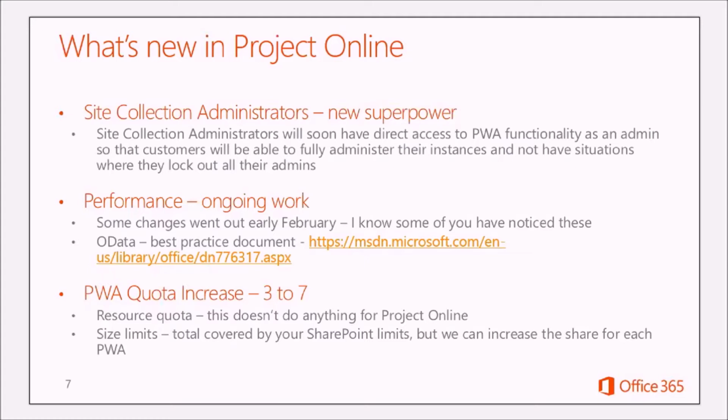So one of the changes we've made is that any site collection administrator in your tenant will have direct access to Project Web App functionality as an admin. So you'll be able to fully administer the instances, and it doesn't actually check the project permissions for those site collection administrators. So it is a super user in that sense. Even if you go into Project and deny that particular person particular functions, they would still have access. It's designed that way so that we don't get these lockout situations where you then have to contact Microsoft to get somebody pushed back into the administrators group, with all of the delays that can cause you.